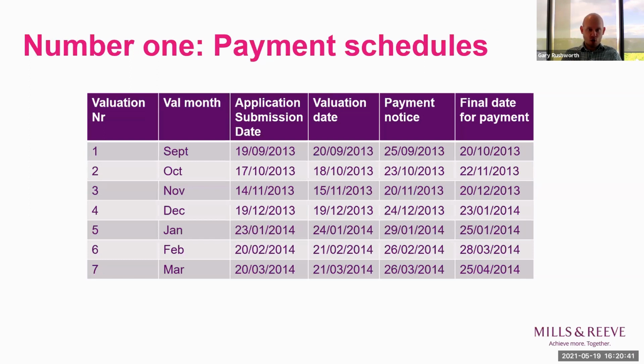And in my experience, it's very common for parties to prepare and refer to a payment schedule in their contract. And it sets out all of the various dates in relation to each interim payment. And as Patrick's run through has shown, it can get a bit complicated. So these can be quite helpful. And the example on screen is an extract of the version agreed in the case of Grove Developments and Balfour Beatty, which I'll come on to discuss in just a second. And as I say, these schedules can be a really useful tool and help the parties know when each of the steps in relation to a payment need to be taken.